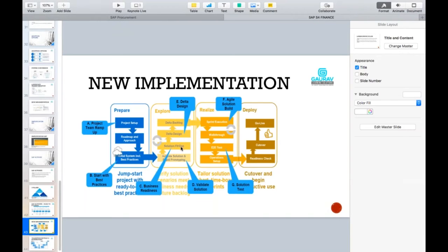After writing the things in the functional specification document, we discuss this FS with the customer. Normally what we do, we understand the requirement and create an FS which is partially completed. This is the normal process which every company is following. Otherwise, you normally sit directly with your developer and tell him what exactly needs to be done. But it is always good practice that you write a good FS, and before you involve your developer, you discuss this FS with the customer, just to make sure that whatever you have written is the same thing that the customer is expecting out of that functionality, out of that customization.